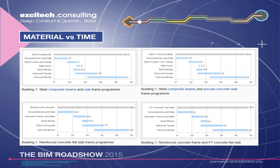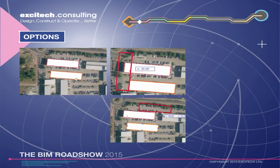I've now completed my feasibility study and have now spoken with the client. I've discussed both options, extending his existing building, building something new. I explained to the client that whilst extending his existing building would incur no extra land fees, he could see, just by looking at these images on screen, we would really struggle with size. He could see that we couldn't extend his existing building due to the lack of space between the surrounding buildings, and just the lack of parking.